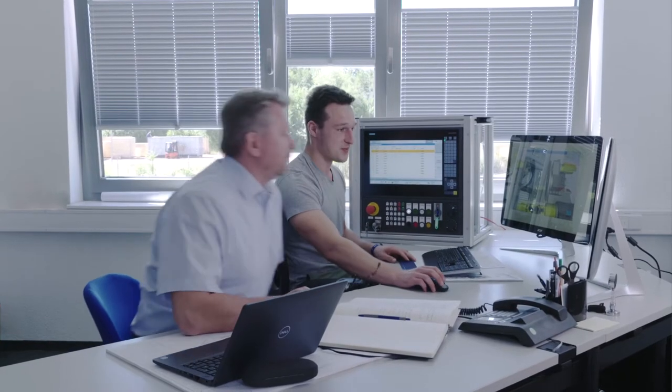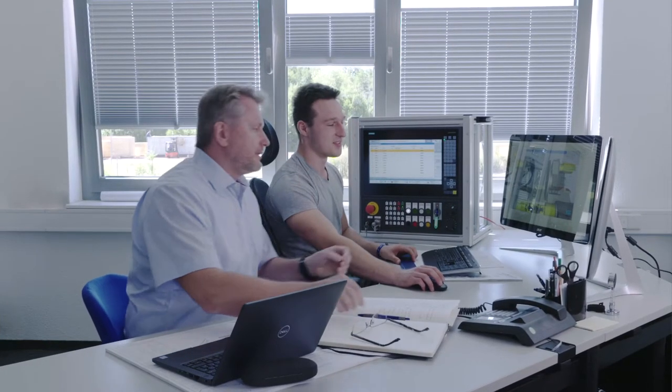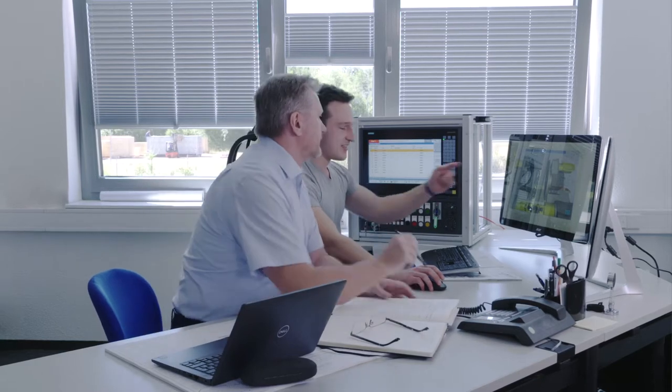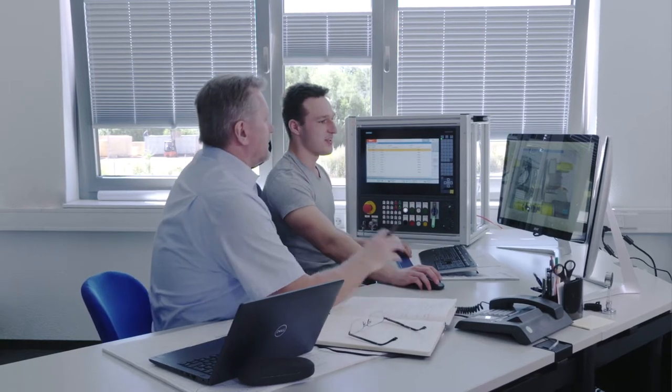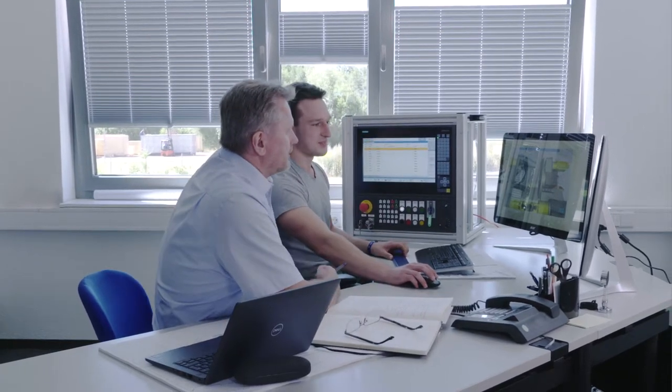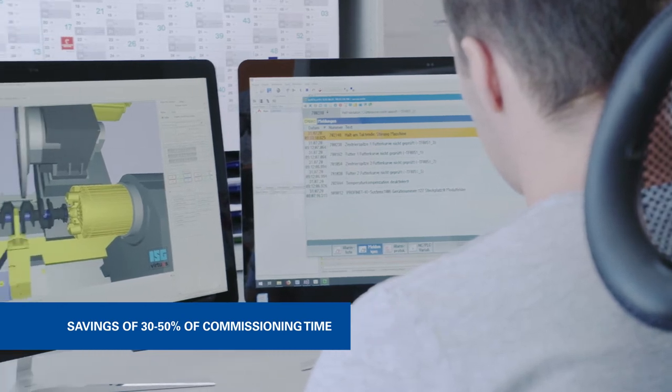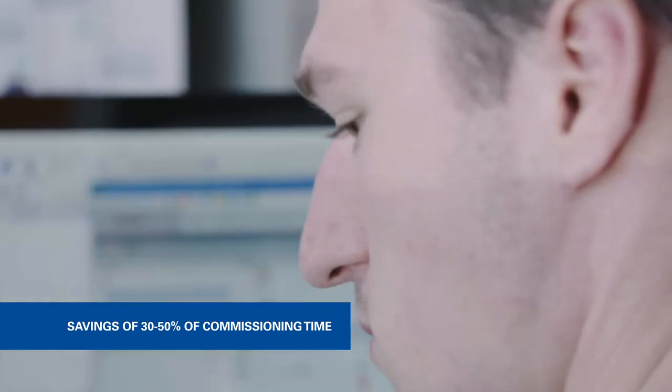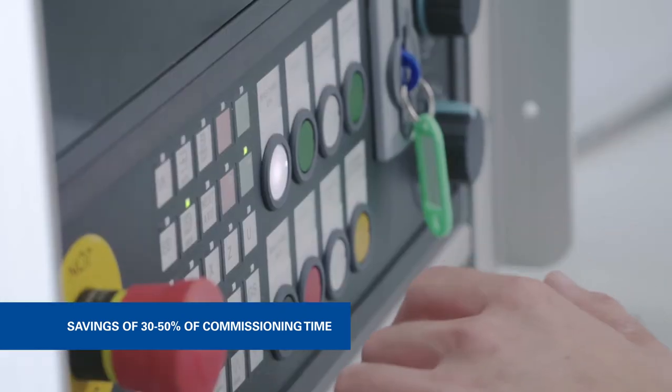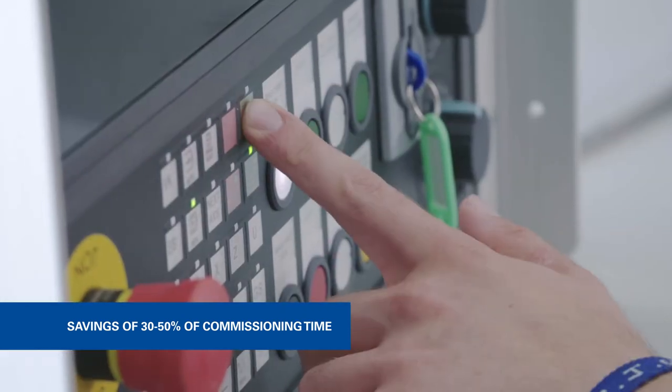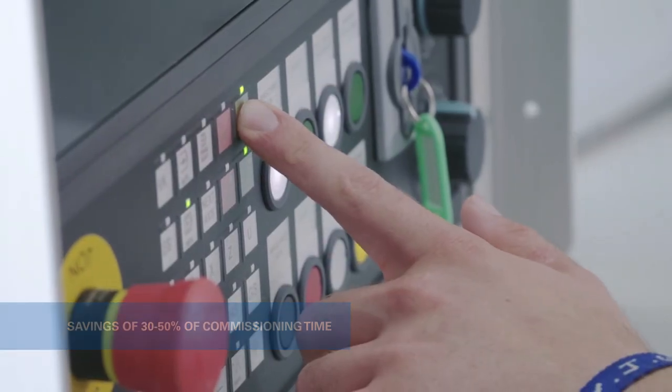A significant advantage for programmers and system engineers in this context is the availability of realistic virtual machine models for performing these tests and verifying their developments. Savings of 30 to 50 percent of commissioning times are viable when using these models successfully.